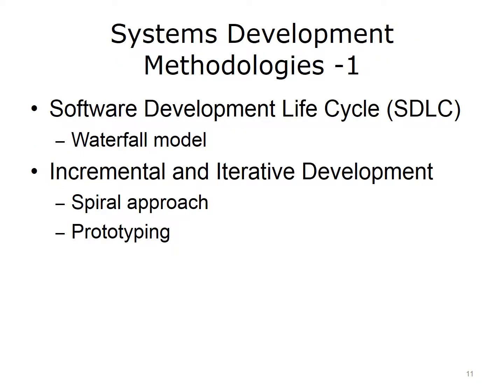There are many different methodologies for developing information systems, several of which will be discussed here. One of them, the SDLC, we just described. It is a waterfall model, in that its stages are implemented sequentially, with the output of one stage becoming the input for the next stage. Strictly following this sequence requires much planning up front, with little flexibility left for changes during the later stages. Waterfall models are rarely used nowadays, because it has become common practice to allow for feedback and iteration during the development stages. Incremental and iterative development methods attempt to address the inflexibility of the waterfall method by focusing on smaller sub-problems and/or by repeating stages to allow for more flexibility.